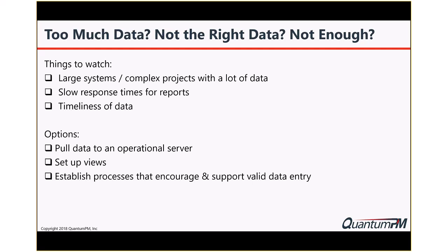The other thing we had with that is big systems, very complicated. It's hard to get them updated. So how timely is the data you have? If your data is out of date by a month or more, trending reports are not going to give you a valid picture. So all this stuff has to be in place before you get there.